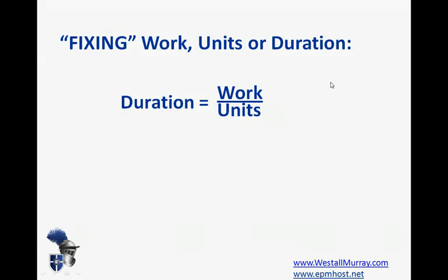And if you think about it in terms of this formula here, if we were to freeze the number of units and then change the work, well, duration would have to change to keep that formula in balance. And we can represent the variations there as follows.